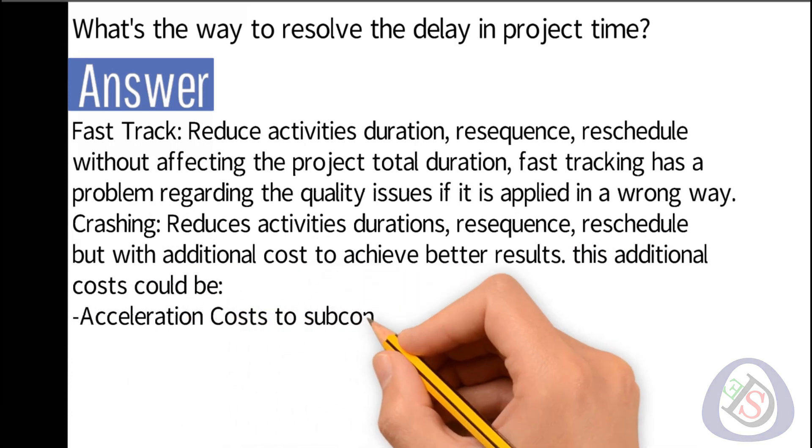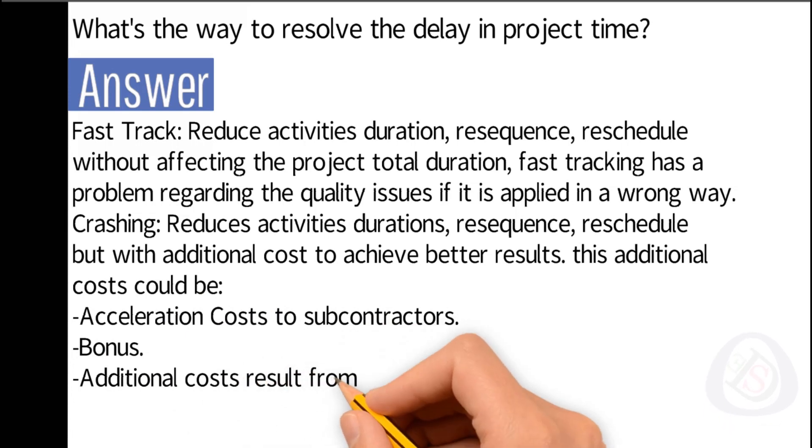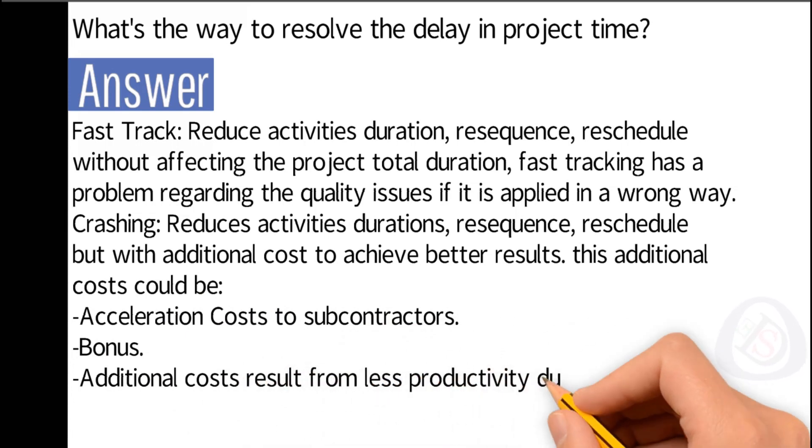Acceleration cost to subcontractors, or bonus, or additional cost results from less productivity due to increasing the manpower in the workplace.